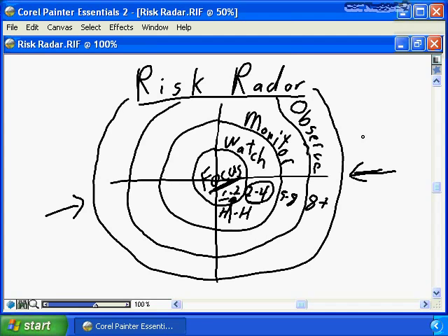but that you don't lose sight of the other risks and that they're still out there on the observed list. They're still on your risk register, and they're still items that you're going to deal with on an as-required basis. Just because they're 8+ weeks out, they could still have actions happening against them that's going to change your impact, change your assessment of the risk. It may change the timeline. It may change the urgency. It may change the impact of the risk that's going to necessitate moving the risk in from the observe ring to the monitor, to the watch, or even to the focus.